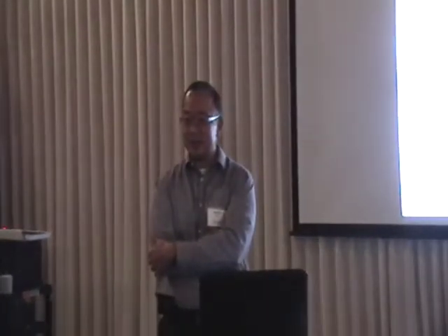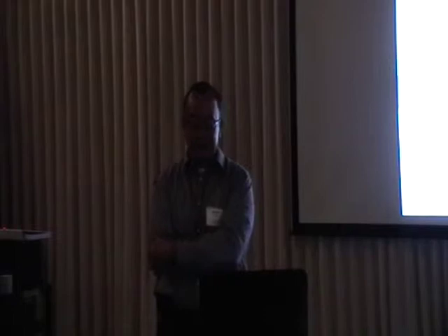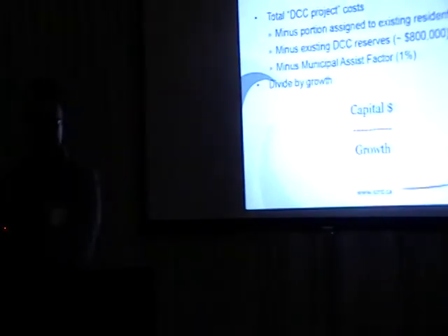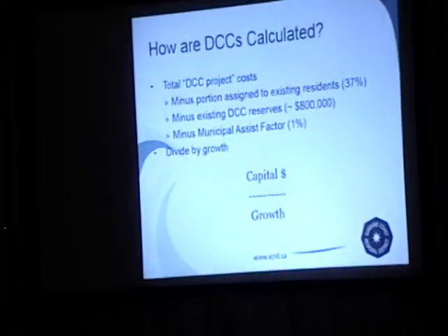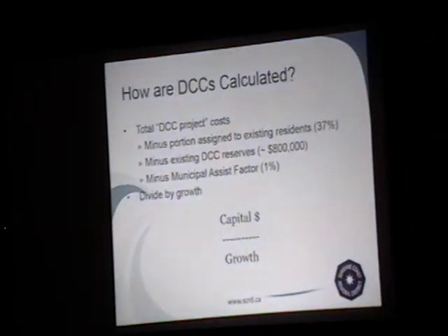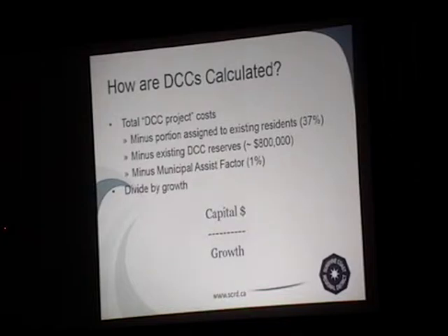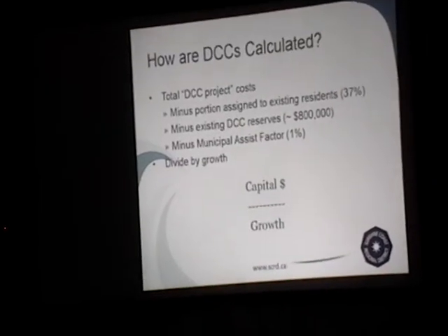Yeah, so it all comes down to trying to get as accurate a projection as possible. If we over-project the growth rate, then the fee will be too low, and it'll lead to a funding deficit. If we underestimate it, then the fee's essentially too high. But it also means that the infrastructure would have to be built sooner. So what's the objective? To promote growth, or to promote the replacement of the infrastructure or the expansion of it? And what is your sustainability plan?